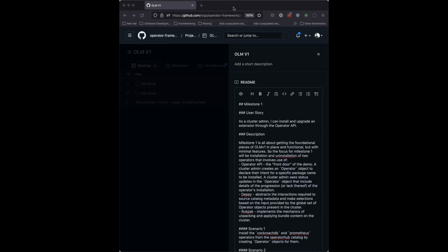One way that we could compromise on being forward-looking versus being clean in the backlog is to start thinking about milestones. We don't even need to think of them as necessarily milestones, but we just need to keep going back to a single document that outlines where we want to end up eventually. That way we have a vision that we're all sharing, a shared goal that we're moving towards. And then the milestones can be how we're going to do it in the real world.